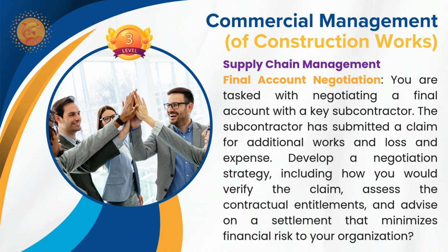Because if you are not going to get paid by your employer, then you are at risk. So you have to make sure that you would be able to carry forward the same claim to your employer successfully, get paid for it or get approval. Otherwise, what are your options for negotiating with the subcontractor? Those kinds of things you have to identify and advise your management and achieve the possible settlement that minimizes financial risk. Anybody wants to add something to this, or you have any experience that you can share?